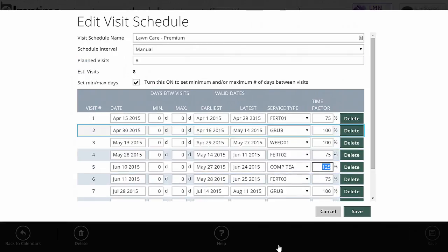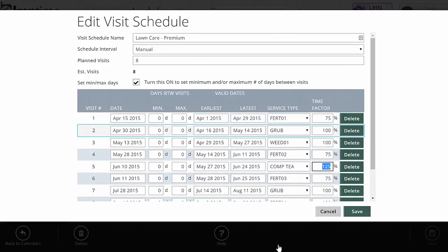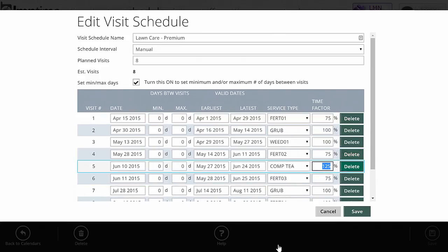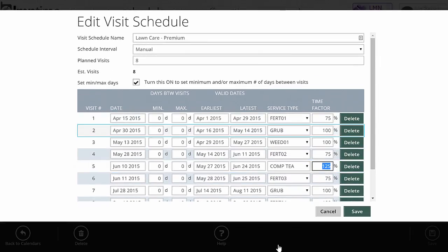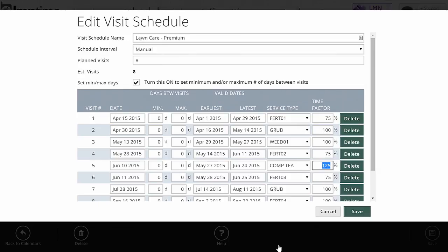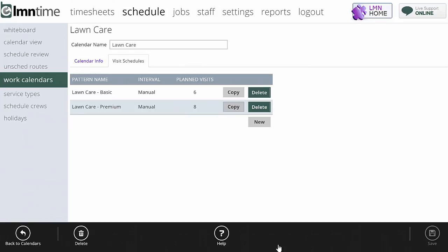Now you have a schedule for eight visits. When you get to a job you don't necessarily have to use these exact dates — more important are the earliest and latest thresholds, which you can adjust for each type of work. When scheduling a lawn care job, just grab the job, pick the lawn care premium schedule, and it will automatically build the schedule out for that job, at which point you can make any adjustments needed. To see how to actually schedule a job, watch the three other videos: scheduling a construction or installation job, scheduling a recurring job on a predictable schedule like mowing, and scheduling a recurring job on an unpredictable schedule like lawn care.